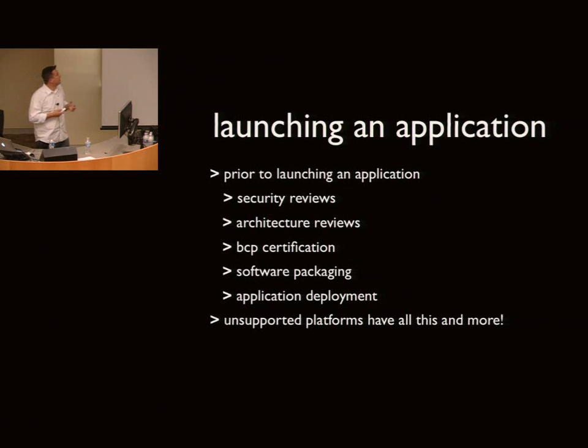Well, most of the time you're going to have a checklist that looks something like this, right? You're going to have a security review where you're going to sit down with one or more security analysts who are going to ask you a questionnaire. Depending on the organization, you may also have a risk assessment step that you have to go through. You're going to have an architecture review where somebody's going to review your system architecture, your database relationships, and so on. You're going to have to get some sort of BCP certification. What happens if your app loses a data center? Does your app continue to function?